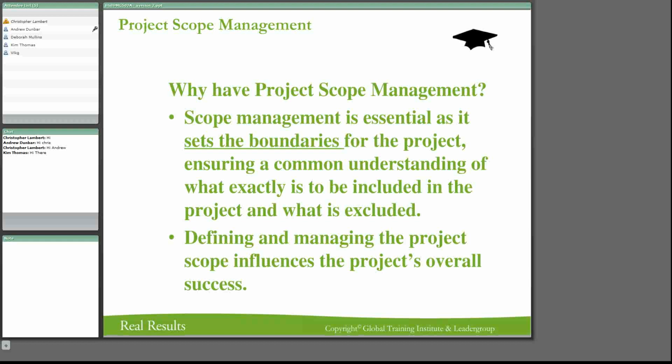Now if we don't say anything about that, if we don't say it's specifically included or specifically excluded, it can become an issue and an area of contention. So I think it's quite important in project management that we also look at some exclusions. We say, yes, the project does include this, but we are specifically not going to include something else. Now, I know that's often difficult to do when you're putting in a tender.